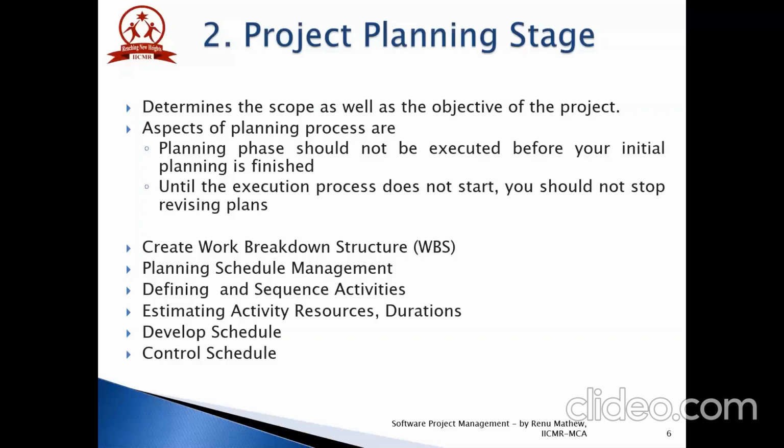After the activities are defined, they need to be sequenced, that is, logically organized. The main output from the sequence activities process is the network diagram. A network diagram is a diagram used for posting the tasks on a board in a logical order. For example, you can start a business in a foreign country. What will be your list of activities and what will be the order in which they should be done?